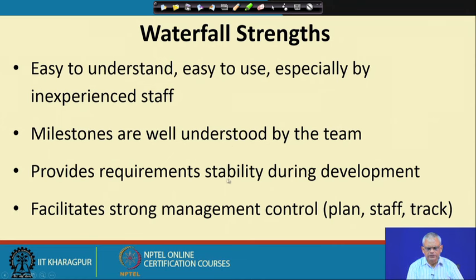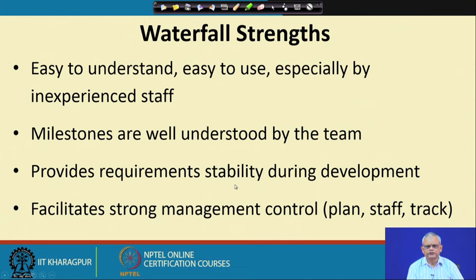The waterfall model also provides requirement stability during development. The requirements are gathered and documented during the requirement phase, and after that there is no change to the requirements. The developers are not interrupted — they start to develop uninterruptedly. They know the exact requirements and start developing the software. If requirements were to change mid-development, they would have to redo their work, change the overall design, and so on. So the waterfall model provides requirement stability; once the requirement document is prepared, it is not changed.